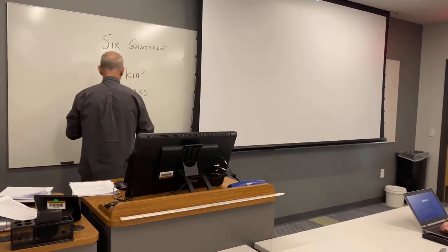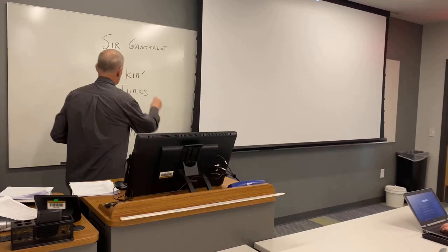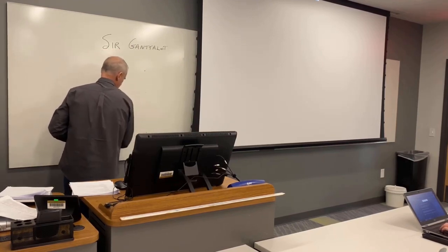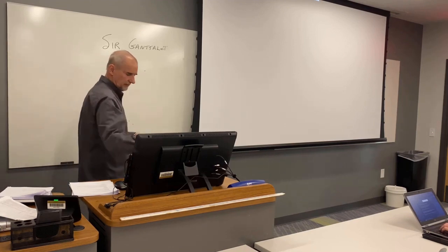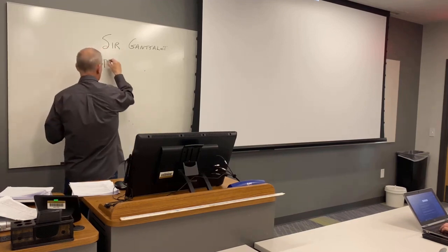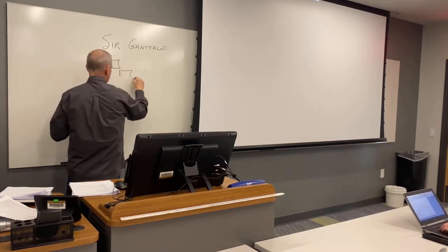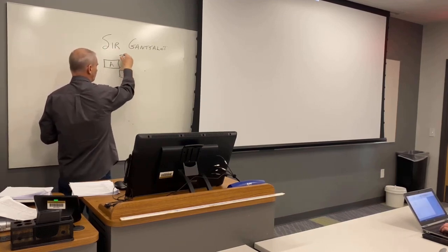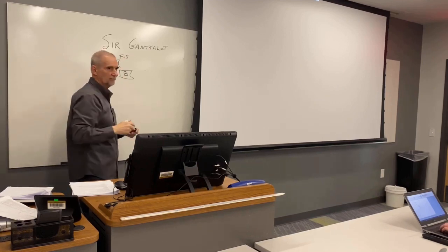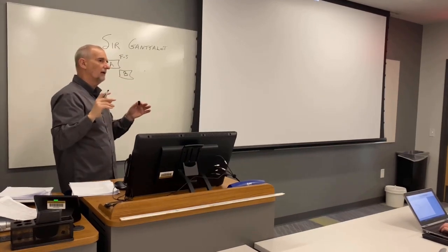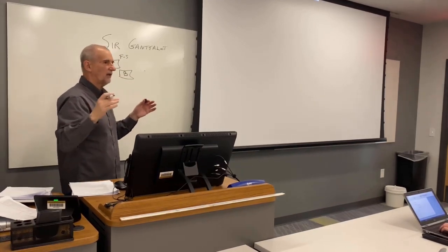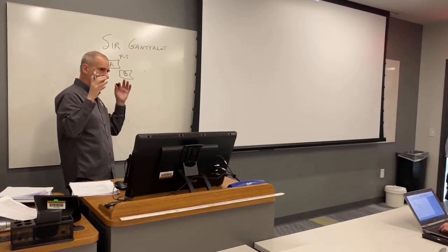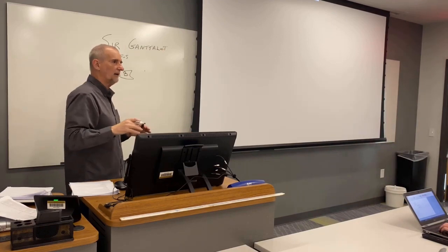So it looks like this. Here's task A, B, called finish to start. Got it? Okay. This is the least risky because you make sure that the predecessor is completely done.